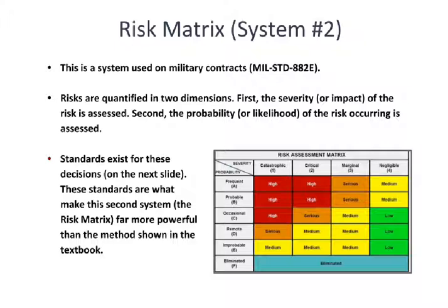You would still have some aspects of the risk table. For instance, the plan, the action plan, and who is going to be responsible for making the decision. That part might still exist. But that center section of the risk table where you decide high occurrence, high impact or high severity, you will replace that portion of the table with a matrix. And the matrix gives you far more quantitative resolution and information about what's happening.